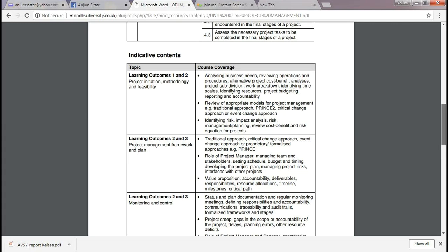That's really important. Setting the schedule, of course, the time frame: when the project will start and when the project will be finished. So in project management we normally use early start, early finish. How early can we start the project? One activity can be linked to others; some activities we can do in parallel, but some activities we can't start until we finish another activity. Like building a house, you can't start finishing the house or the windows within a house until you build the structure of the house.